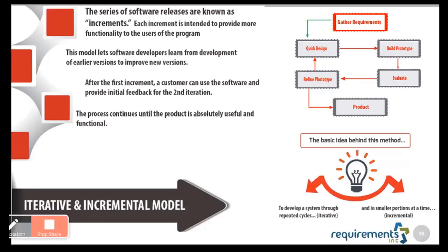So you'll have A1, A2, A3, A4, A5, A6. Okay, now that we're done with that, now let's do B1, B2, B3, B4, B5, B6, and so on. That way, you at least learn something from missing in the A cycle, and you can at least get caught up in the B cycle.